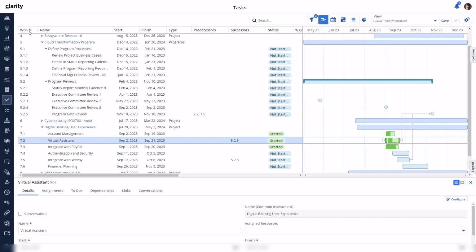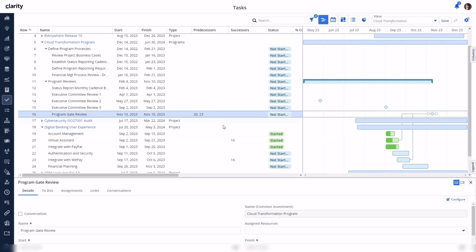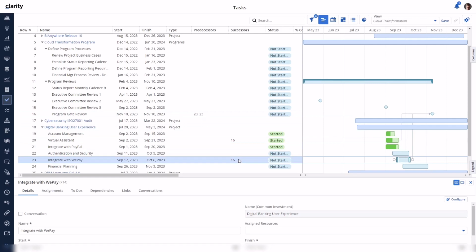Linking the tasks using the dependency properties is informational only and doesn't have any impact on moving or adjusting task dates manually. Currently, the only impact of the properties for the dependencies is when the auto-schedule, PPM Gantt, or other schedulers are used for project-type investments. When the investment blueprint exposes different subtabs for the details flyout, you can also take actions to manage assignments, to-dos,